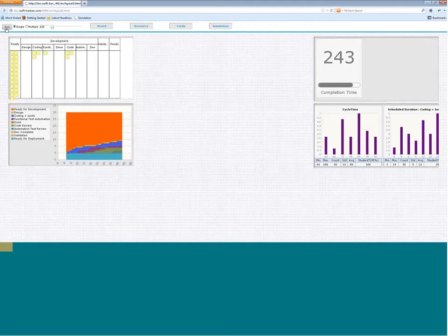Right, so it roughly went down by about 180 time units, but I ended up adding significantly more resources to the team. So you could always go to a customer and say that, okay, if I need to reduce the calendar duration of the project from this to this, I have to add so many more resources at this stage of my work of this profile, and therefore that is the additional cost. This is the price that you need to pay additionally for a crash timeline.